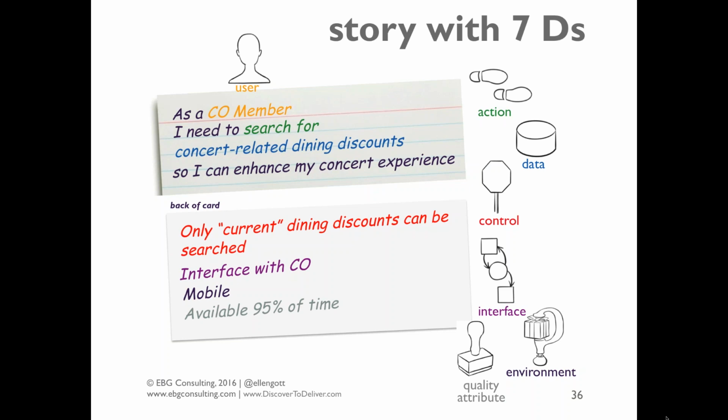Things like, these are all true stories. A team that was using different browsers and different browser versions in different countries, a very quick conversation they could have had about the environment dimension that would have saved them weeks of rework because they had a different understanding in different locations of the environment. Or the team that had a key interface missing. They forgot, this was in a pharmaceutical environment, that there was an interface to a physical device that they had completely forgotten.